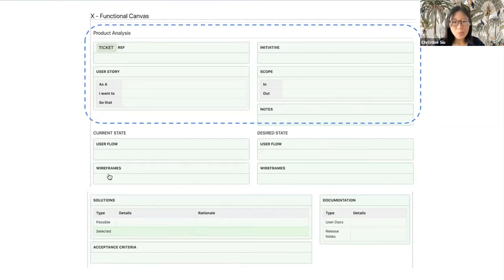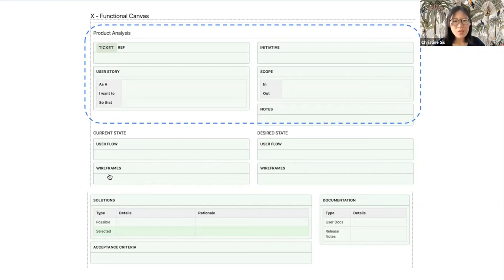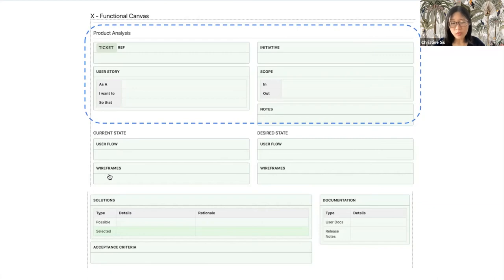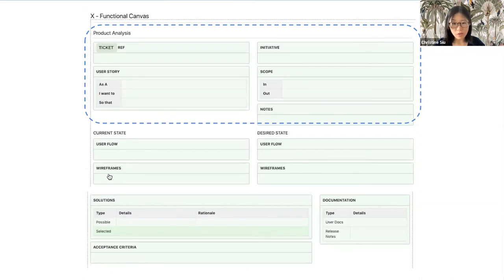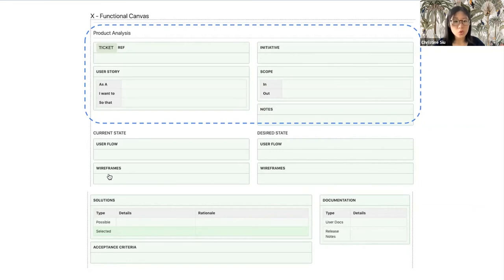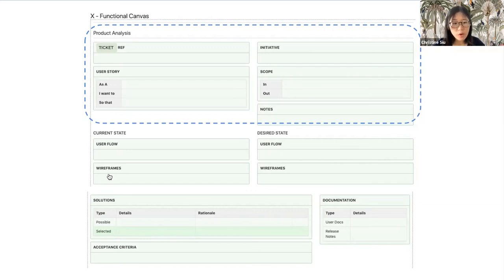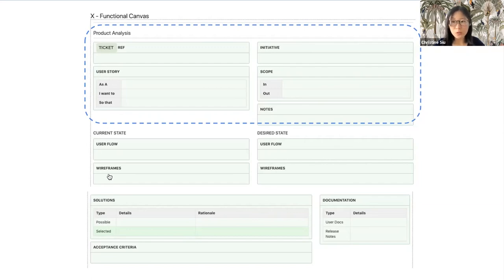So, what does the workflow look like? How do you use the product canvas with your squad? The way I have used it with my team is that a product manager would lead, and they would fill out the template from the top. You don't need to fill in everything before asking for feedback within your team. As soon as you've written your user story and scope, get it reviewed.